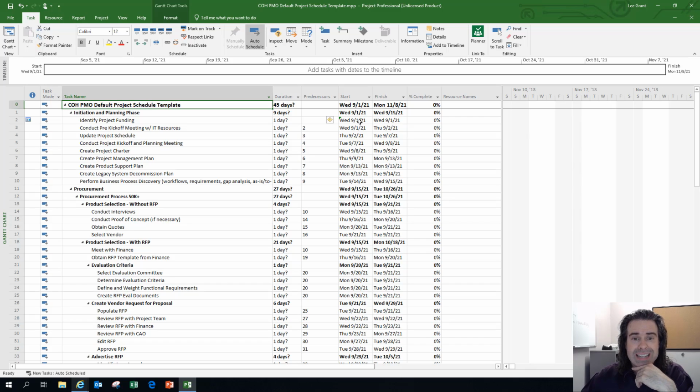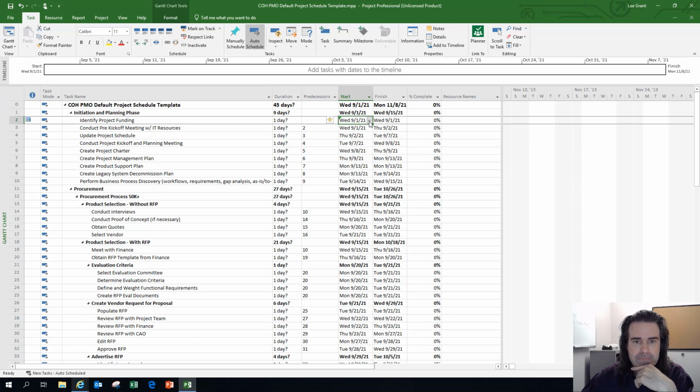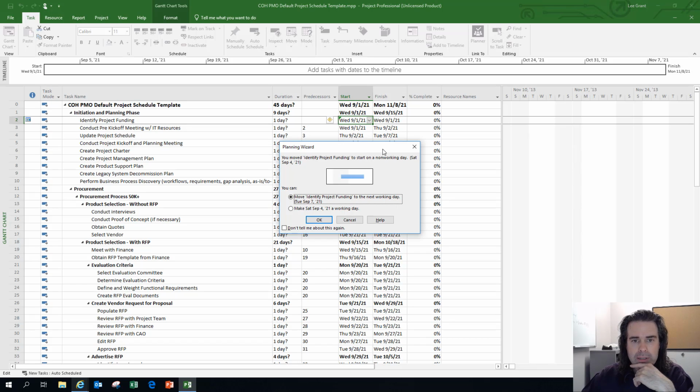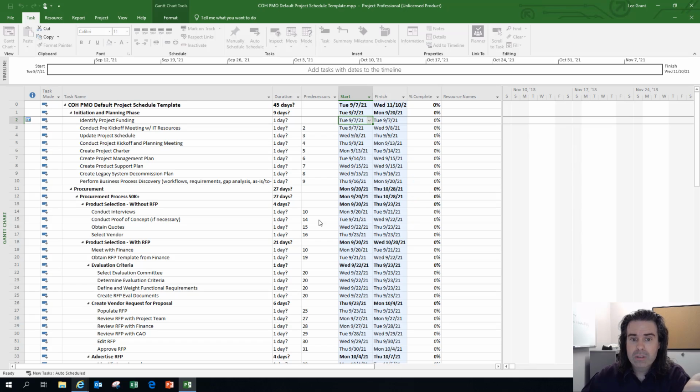So the first task start date is here. I'm going to change this. Let's say I picked a working day, Saturday. Oh, that's a non-working day. And will you allow us to move it to the next working day, which is Tuesday the 7th? I think Monday is a holiday in 2021, on the 6th of September.